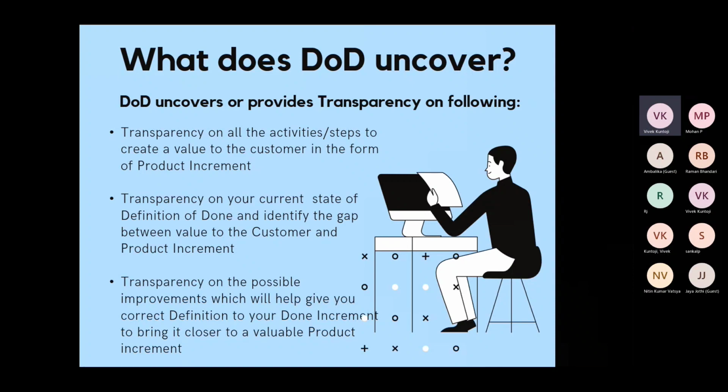It could be like earlier you were not performing, say, code reviews. Just an example. So now you have identified that we are not delivering the complete value because there was some miss that has happened, and the reason for that miss is you had not done a thorough code review. So next time, how are you ensuring that that code review is happening? You will ensure that you include this point or step in your definition of done criteria. And then next time when you work on future work items, you will ensure that all your work items are being passed under that code review state. So this is how you can bridge your gaps.